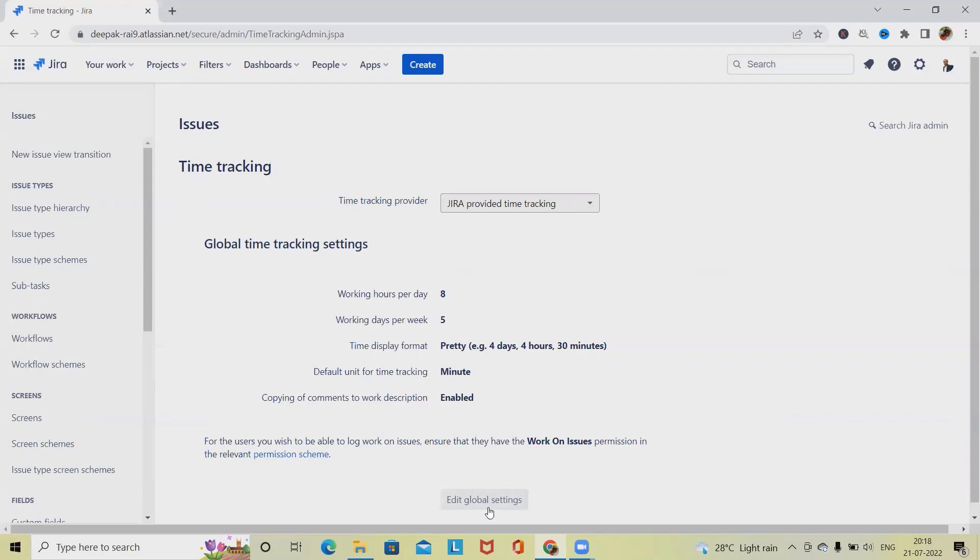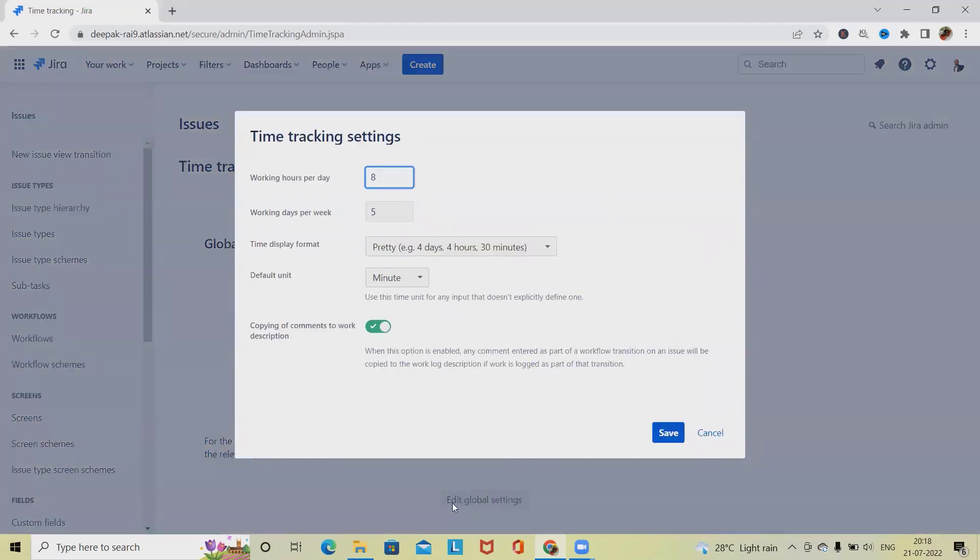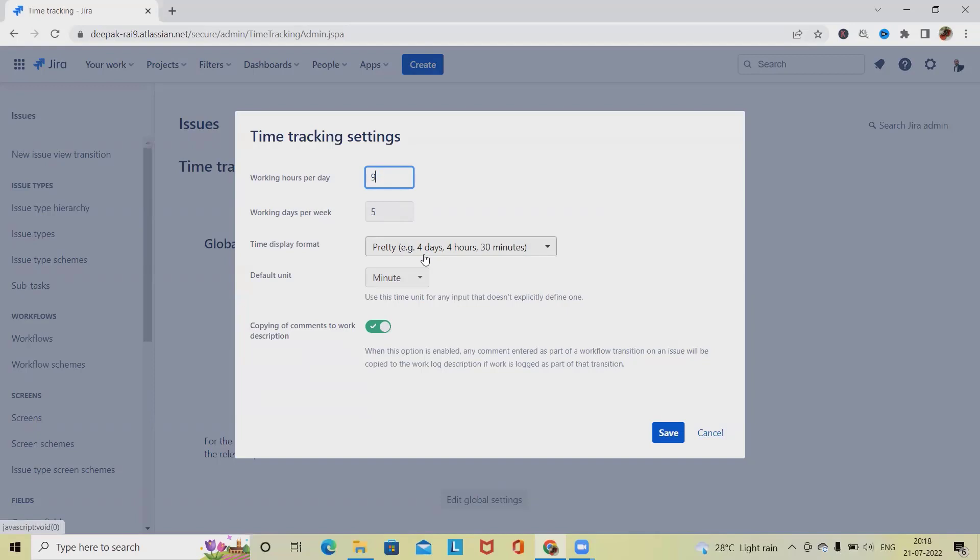For global settings or for updating global settings, we have to click on edit global setting. From here we have to specify the working hours unit. Let's say if our organization's culture or requirements are in a certain way, then we have to update accordingly. If we have working days per week as six, then we have to update that detail as well.